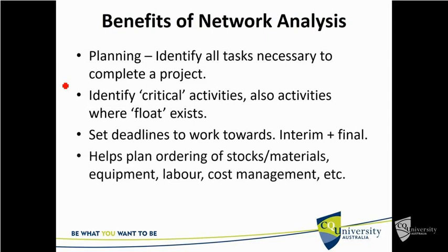Analysis also helps you plan the ordering of your materials, your equipment, your labour. We always want those to be just in time, so we haven't got money out of our control and out of our bank account sitting in someone else's. We always want to pay as late as possible.